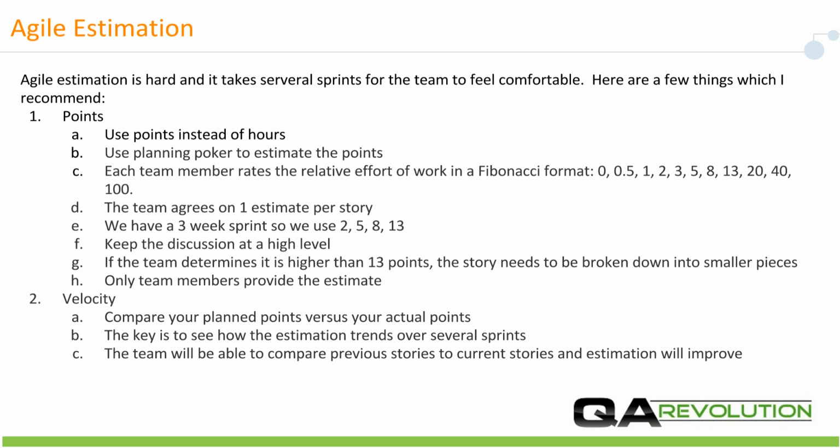And once you've had 3 or 4 sprints, you can take a look at previous stories and use that as a guide to figure out what your point estimate is going to be. So these are a few things. Obviously, there's a lot more in terms of estimation, but these are a few basics.